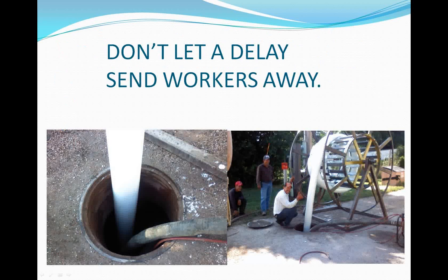By being able to do a change order in-house on a project and not have to wait for an engineer to send a person out, do the examination, you can keep the project rolling. You can avoid costly delays. The change order that I did for this project took 2 days to get through the design and the DEQ approval. It's that simple.